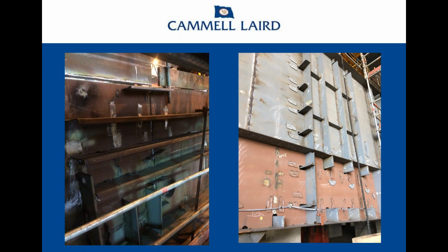I just thought I'd show you these two pictures, really, because the one on the left shows two modules coming together. This was on the polar ship, and what you're looking at is the outside of the hull with the temporary steelwork that's been placed so that the vertical all-important joining welds can be made. Remember that plus or minus 6 millimeters, or as I say, plus or minus 3 millimeters. You've got to get it right first time. You can't change the shape of this. Once it's done, it's done.